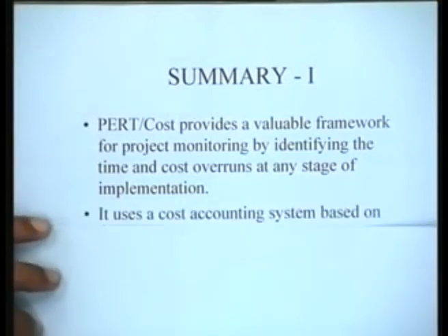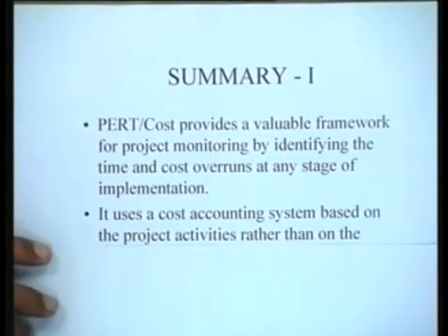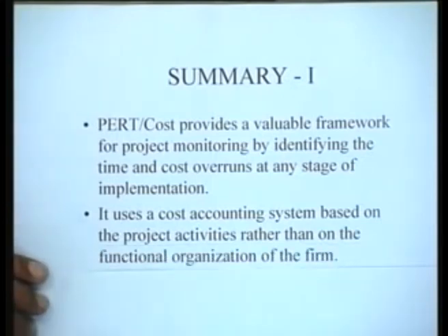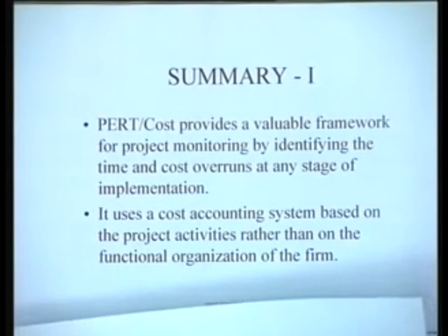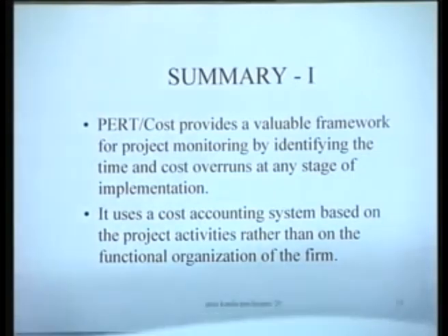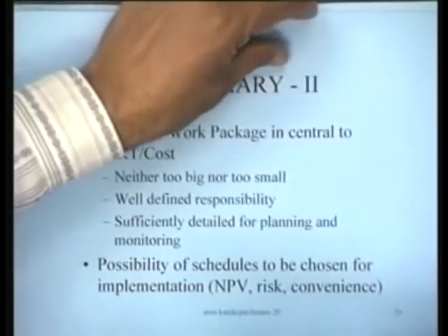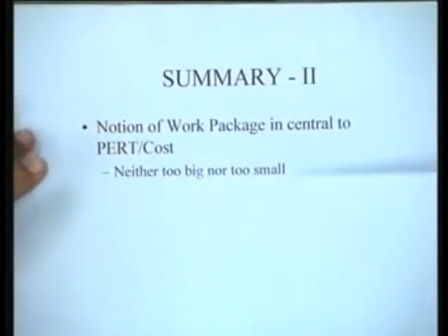Then it uses a cost accounting system based on the project activities rather than on the functional organization of the firm, because all the costing is done with regard to the individual activities, and based on that system we have actually worked out how the expenditure is going to take place. The notion of the work package is central to PERT cost.